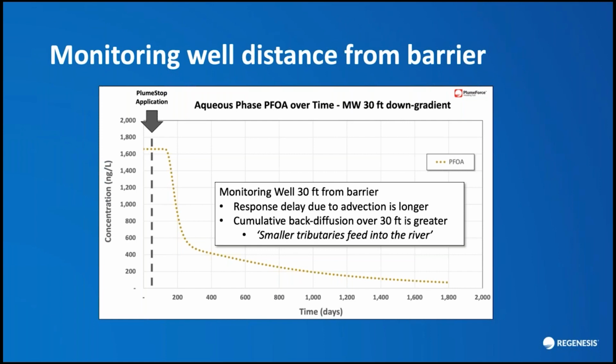Monthly sampling for the first quarter, reducing to quarterly sampling thereafter. And then the influence of the barrier arrives sometime in the second quarter. And this makes it a tense 6 months before any results are seen, despite all of the sampling. This is a good example of where it's helpful to manage expectations. When do we expect to see a monitoring result? Well, this can be estimated in advance using modeling.